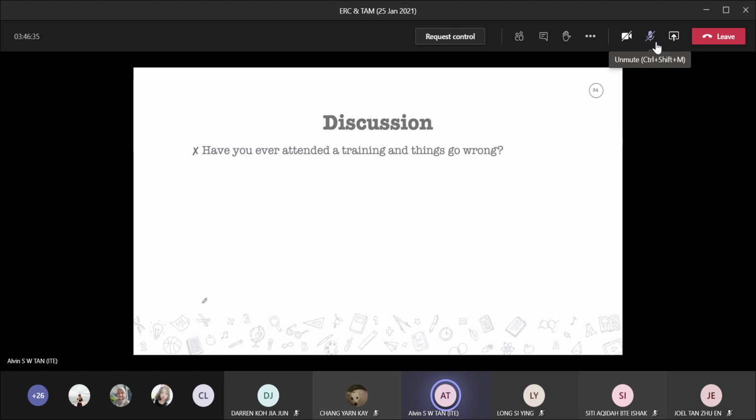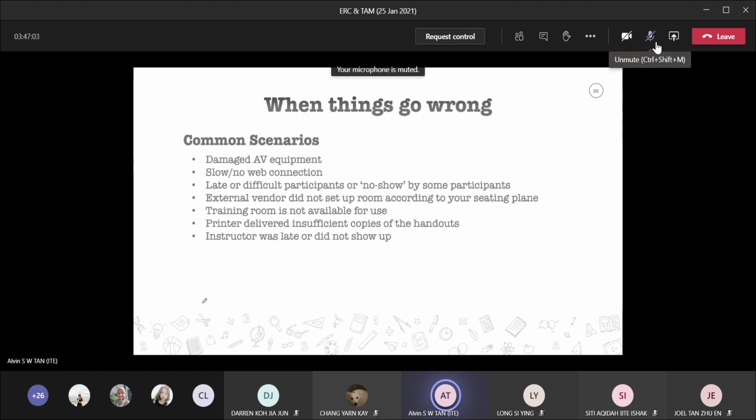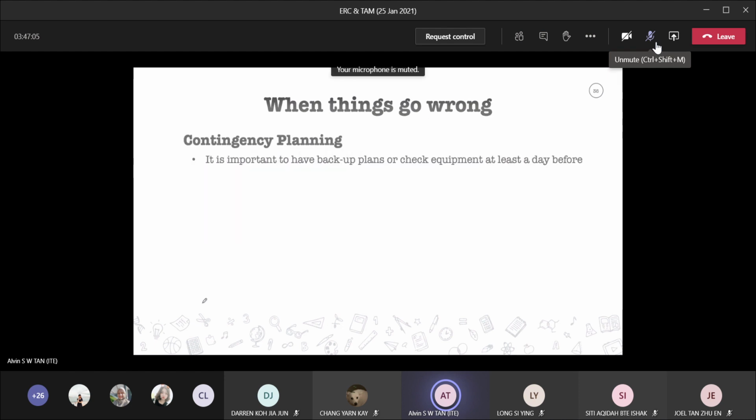Half an hour before the commencement of the talk, Dr. Chris' account expired. So even though we had done our due diligence in checking, things still go wrong. But these are things that are beyond our control. However, because of this, we need to have a contingency plan.